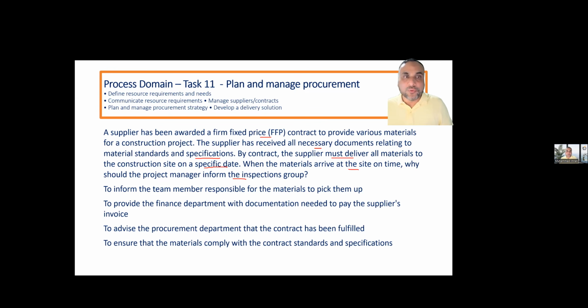When you read the word, what is the purpose of inspection? Whenever someone is going to deliver, first the quality control team will check it, then a third party quality control team will verify it, and then you will go to the sponsor for acceptance of the deliverable. Then you will submit the invoice and close the deliverable. So you know the answer.